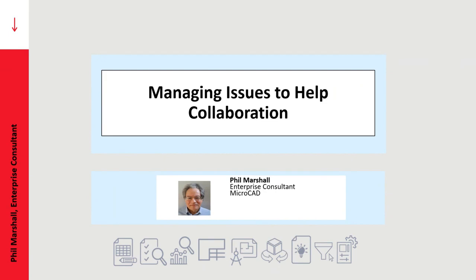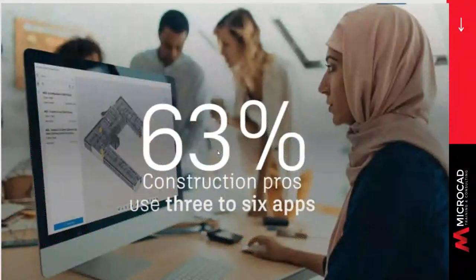But the way most projects handle issues doesn't deliver on that requirement. In fact, most projects isolate the design data from the construction data. This happens because a project may use more than one collaboration app to do project management, including creating and managing issues. When you do that, you isolate the people, preventing them from communicating effectively. Worse, you silo the data, making it difficult for pre-construction engineers to see the design data and for the design engineers to see the pre-construction plans.